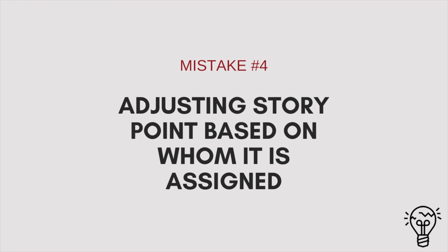Mistake number 4, adjusting story points based on whom it is assigned to. Now, you may notice from time to time that a user story is a 3-pointer for a senior developer and an 8-pointer for a junior developer. Again, if you see this happening, try to get your team assigned story points by comparing the user stories with reference stories, and not with the level of experience individuals have.